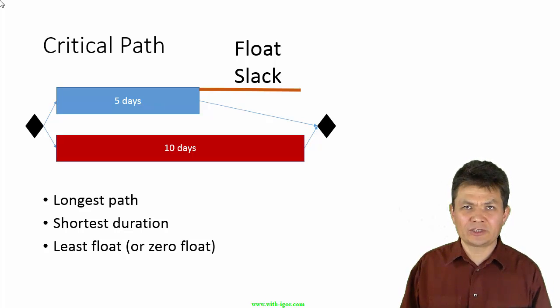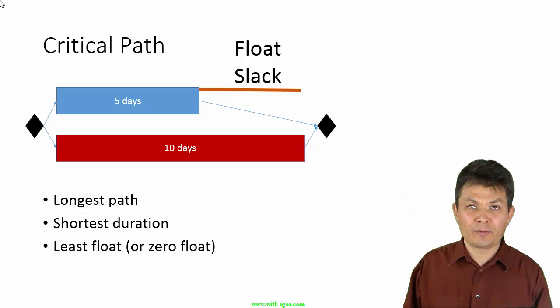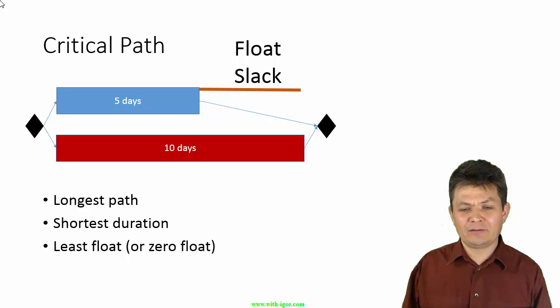We always tell ourselves, as scheduled right now, because definitely we can put more people on the 10-day task and probably finish it in 7 days. Then, yes, of course, then the critical path may be the same, may be different. But we are talking about the schedule as it stands at this moment in time. And that's why it is a moving target. If your schedule changes, your critical path might shift, and it shifts all the time.